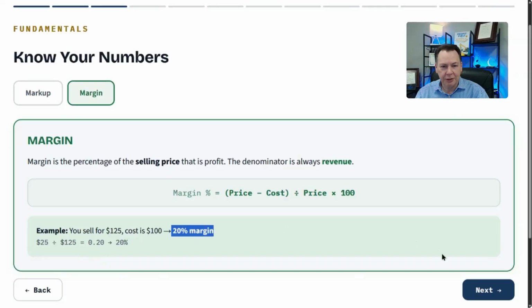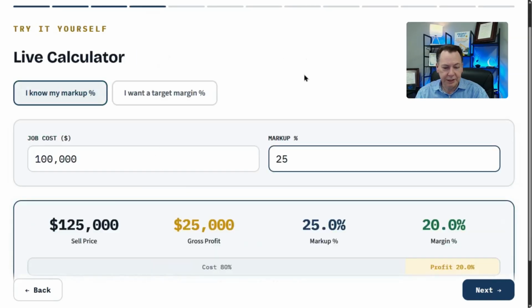It's math that contractors really need to know because they're thinking, I'm going to make 20%. And they don't realize that 10% plus 15%, just adding 25% on top, does not equal that. So that's where I wanted to walk through a couple of case studies.